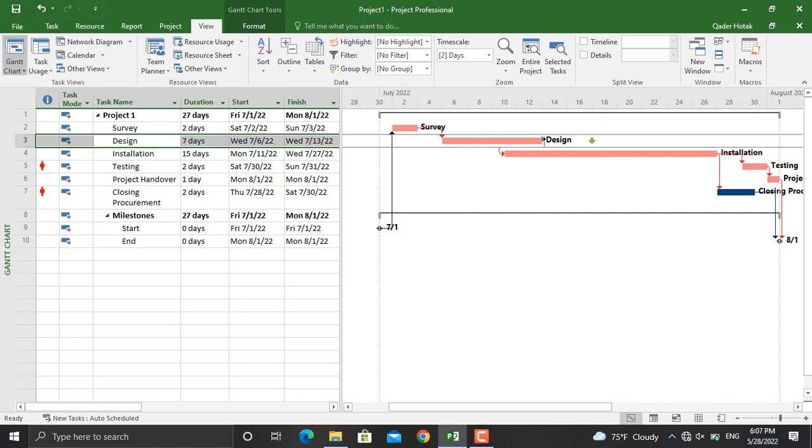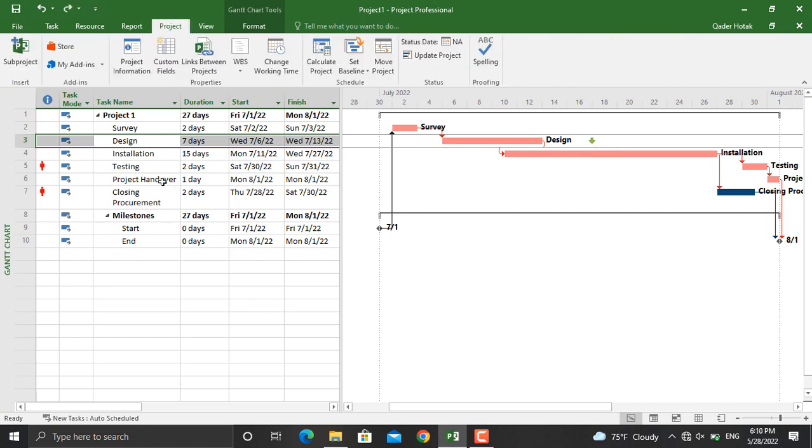As you can see here, a deadline marker will appear for this activity. So if the end date of this activity goes anywhere further than this date—the 17th July that we assigned—it will be shown as a late activity. Moreover, if we go to the properties of the activity...